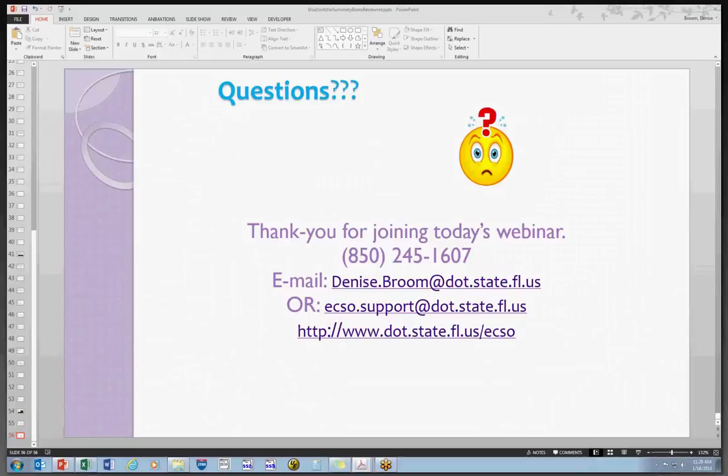For the most part, you should be able to see the area ID and a quantity, or a length and a width and a quantity for most of the pay items, and you should know where things are located. So you should not need to go into the backup calculations to verify if they missed the length by 6 inches or missed an area by a square foot here or there. That's not the purpose of your reviews. It should not be to that level.